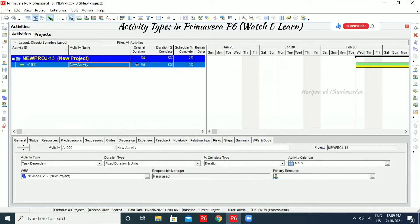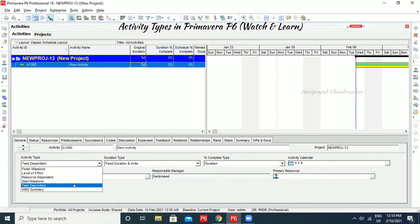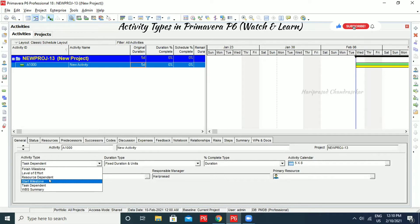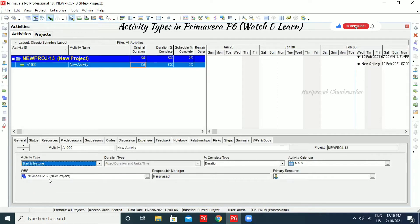We can specify the duration. Now we can just go for General here. We can see the activity type where we can select whatever we want. I am just going to consider this as a Start Milestone activity. When you click Start Milestone activity, immediately the duration becomes zero.